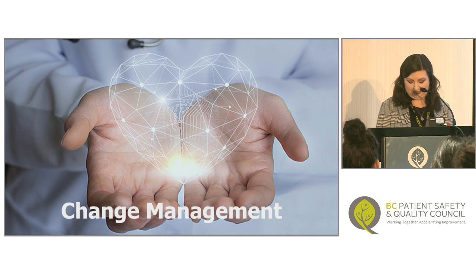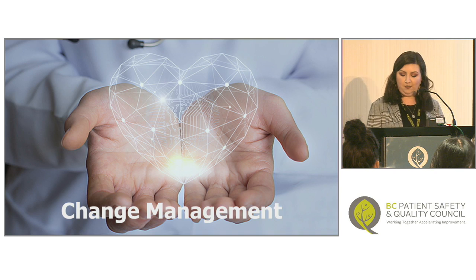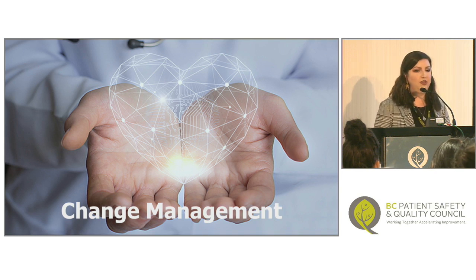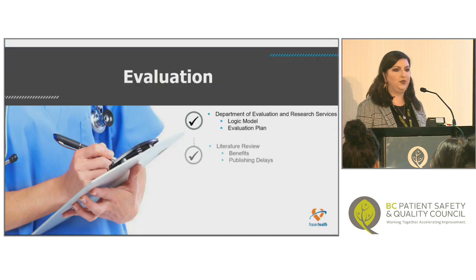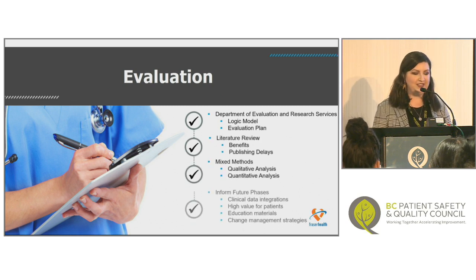It would dictate the success and whether the patients would uptake and adopt MyChart, as well as clinician promotion of MyChart. We used the ADKAR method for change management, and we focused on not just what we were rolling out, but how we were rolling it out. That's why we focused on that small-scale, deep implementation, so that we can incorporate lessons learned as we went. As with any pilot project, evaluation is key.